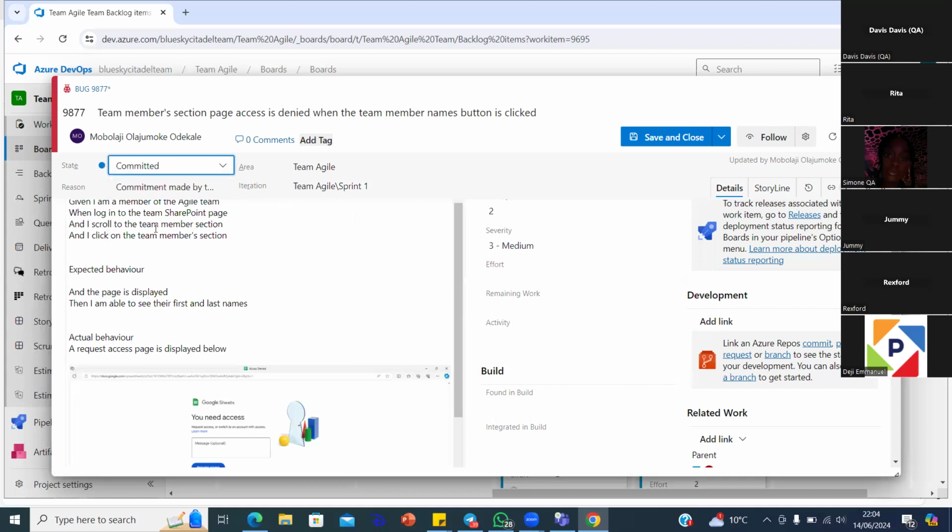This is on the assumption that you don't know who's going to fix it. It might not be the same developer, and it's also possible that even that developer is not free now. If you already know the developer that's going to work on it, you change the name to that developer. And if the developer is free and says, yeah, I can work on this, you can put it in dev.